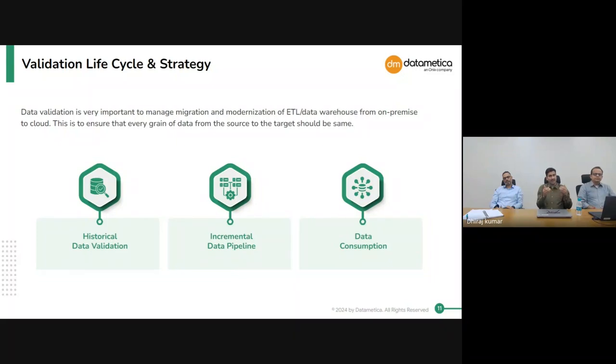And if a table has more than 100 columns, it is very difficult to migrate and test. Yes, we can use our technology and tools to migrate data from the legacy to cloud platforms. But still, as I said, it is not possible to do migrations in one go. The work needs to be split into small chunks, and then we migrate. And there may be some custom tool required to migrate the data from on-premises to the cloud platforms.